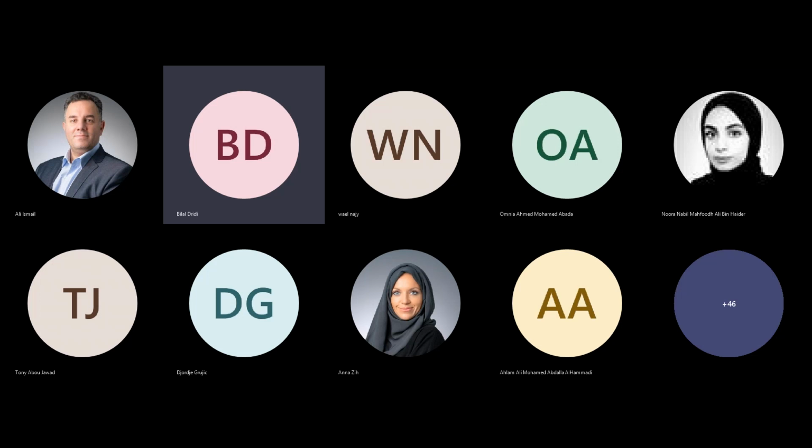As the size of the owner grows, the owner is responsible, he has all the rights about the building and the information related to the project. So he has to secure and protect that information by creating a CDE or assigning somebody who is going to take care of it. But for the owner of a villa, for sure it's not necessary to set up a common data environment. And for an owner like RTA or Dubai municipality, for sure they need to set up the common data environment. But in general, the owner, yes, is responsible for the CDE.